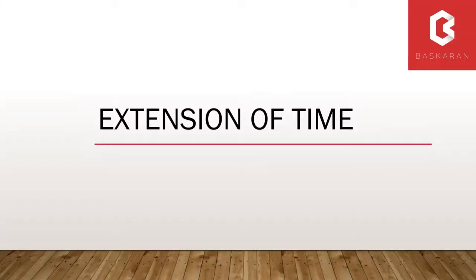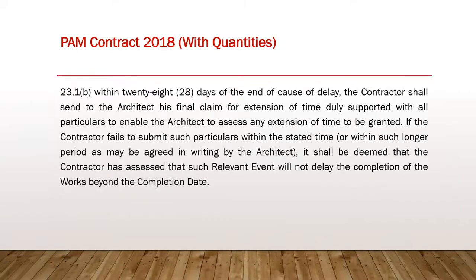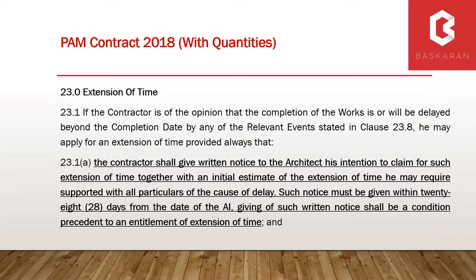Moving on to extension of time. The PAM contract has the usual standard extension of time clause, with very express provisions regarding notice. There are two notices required under the PAM form of contract: the initial notice under Clause 23.1A, issued within 28 days after the event of delay, which gives an estimate of the extension of time required; and then a further notice containing the final claim for extension of time. Both provisions expressly state that they are conditions precedent to any entitlement to extension of time.